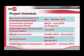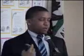Once that is awarded, then we will have an approximately 60-day or so period where we give what's called a limited notice to proceed to our contractors to give us submittals and all those different things, and then we determine what the scheduling of that project will be. And then that project will start about October of this year as the box culvert is wrapping up. We have been in discussions with the city, and they have asked us to come back again in the September timeframe, after the summer vacations and after Labor Day when school's back in, to meet with you all again and give you a more firm schedule of how that construction period will progress.